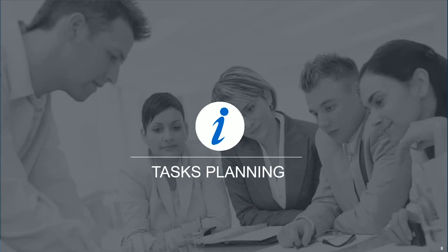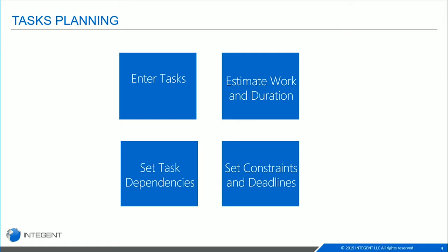So today we're going to focus on task planning. There are a couple of different steps that we recommend you go through. The first one is entering your tasks, which is just how it sounds. You put your work into manageable pieces, which are your tasks. Then you do the estimates for them. It can either be work or duration, or sometimes you have both. We'll review whether you have a work schedule that you need to focus on, if that's what your organization looks at, or whether you have a duration-based, a time schedule that your schedule works at. And those are the two that we're going to talk about today.